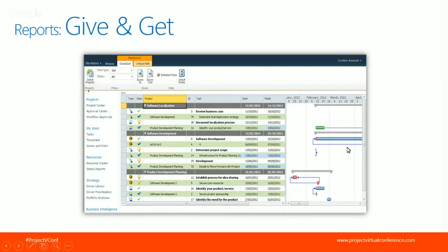It's very helpful in an integration meeting or status meeting, where you focus only on those that were changed. We have customers for whom, by Thursday evening, all the tasks have to be approved, or else the next morning the discussion will be only on those that were not approved. So you have maybe five or 10 tasks that were not approved, and all the others are aligned, and you can see the full picture of what needs to be discussed in this status meeting.